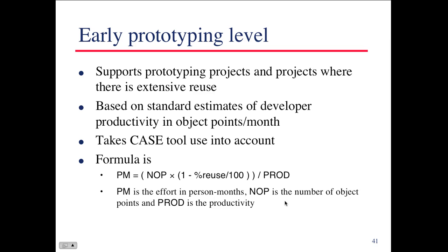If you remember what I talked about last time, I talked about function point analysis. You can even use it for object points as well, to count different components or pieces. It gives you a complexity measurement depending upon how many internal and external function points there are. You add it all up and come up with a complexity measurement. Same concept, except you're applying it to different characteristics outside of function points. It gives you the person-months it's going to take.